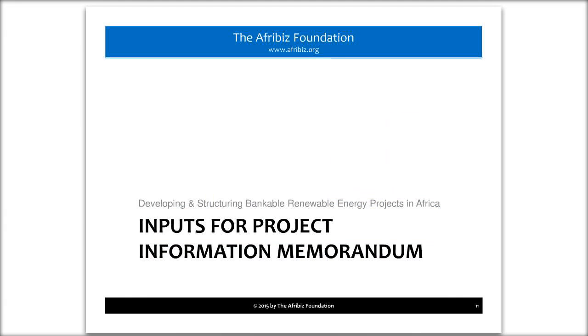Okay, so let's start talking about the inputs for the project information memorandum. And to be truthful, this can be a little bit confusing. I think it may depend on which region you're in, maybe even institutions. Typically, the information memorandum is what you give to lenders about your project, and it doesn't have much detail. It doesn't have all of your feasibility content in detail. It's more of a higher level summary so they understand what the project is and the financial structuring.